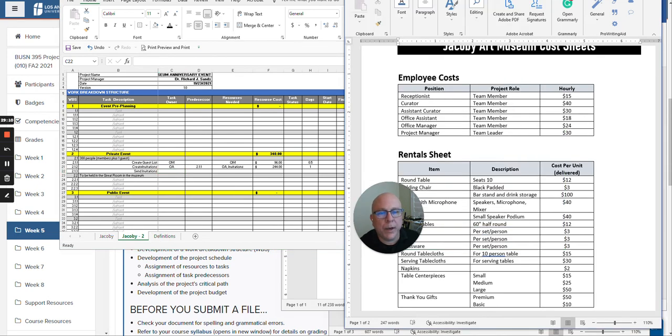And then send the invitation. We're going to say, well, we'll just give it to the project manager. They need to be busier. And so, okay, what is the predecessor? Well, we got to create them first, right? So we got to do 2.1.2. So that's got to be done before we can send them. Who's going to do it is the project manager, and what do we need? Postage.